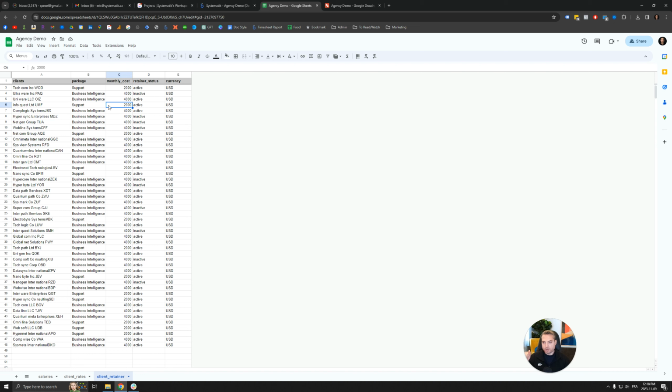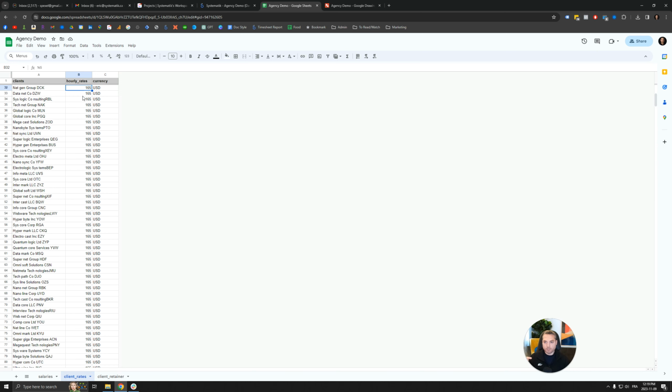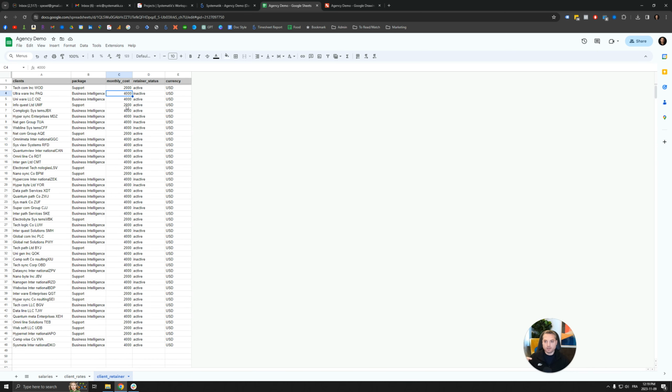If the monthly package is still active at the beginning of each month, this would be added to our dashboard as revenue, and for every task completed in that package we would not consider the hourly rate, since it has already been paid for using the monthly retainer cost, right?